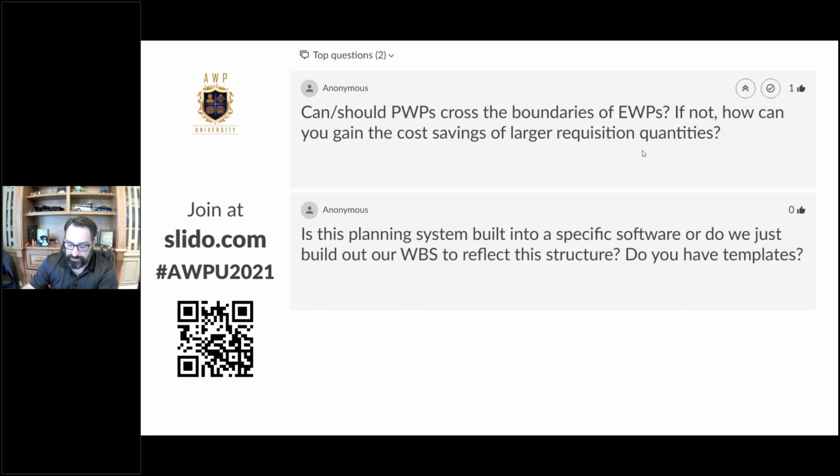Obviously larger cost savings and requisitions with bulk buys, we're going to have that effect. And then that schedule activity for those bulks will tie to it. Where it gets more complicated is where we've got bulk buys with multiple delivery times. For instance, if we've got a PO that's saying that there's going to be 3 different deliveries, sometimes the allotment of bulks, just like anything else in material management, can be difficult.